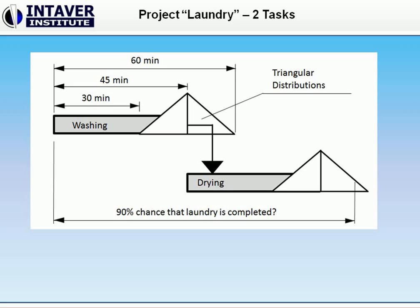Based on this parameter, the critical path method will calculate detailed project scheduling, including the start time, finish time, and all the activities of the project. The critical path method is a scheduling algorithm that calculates the start and finish time of each activity, as well as determining the critical path, floats, and other schedule parameters.